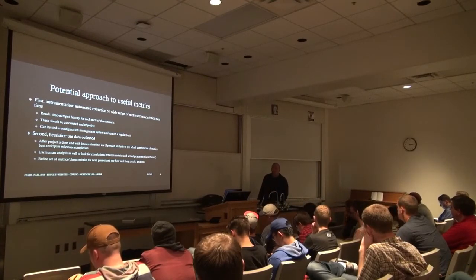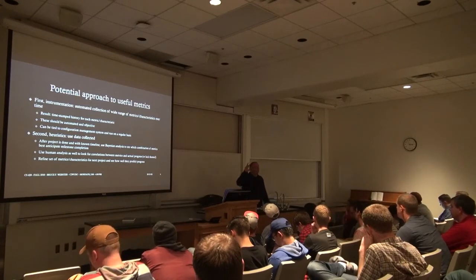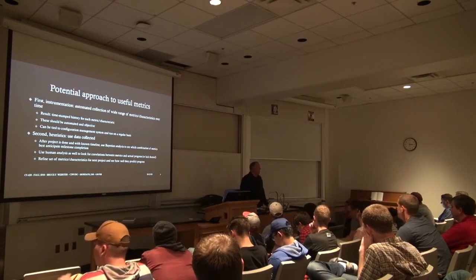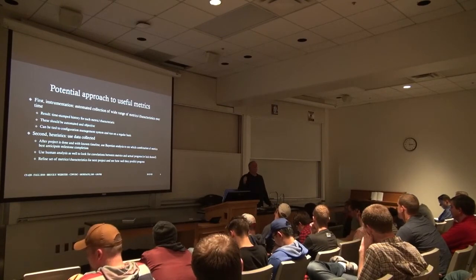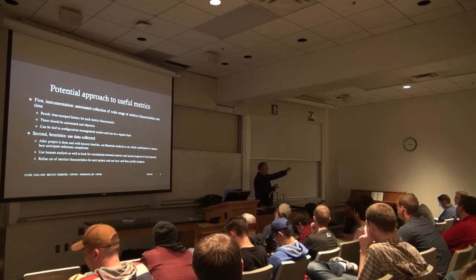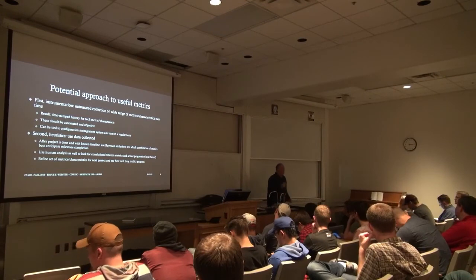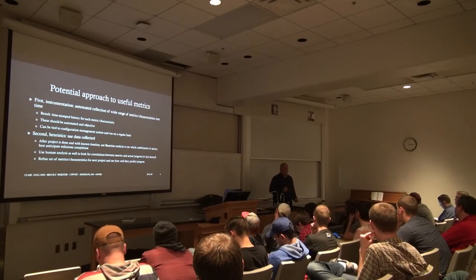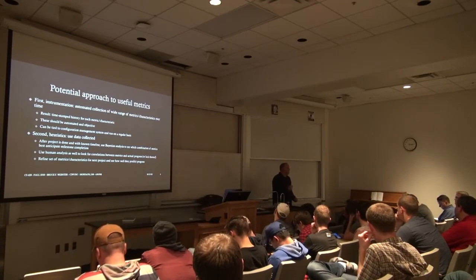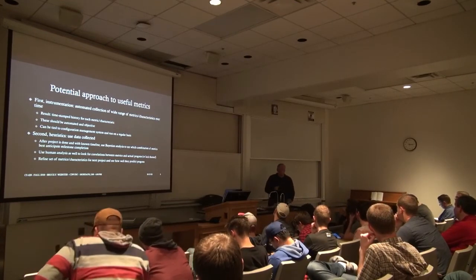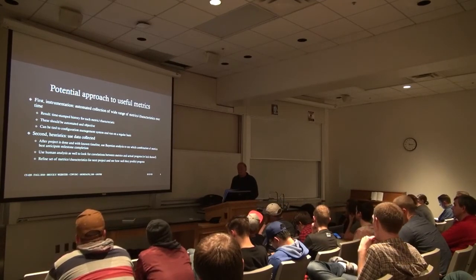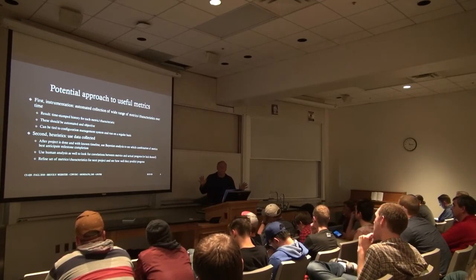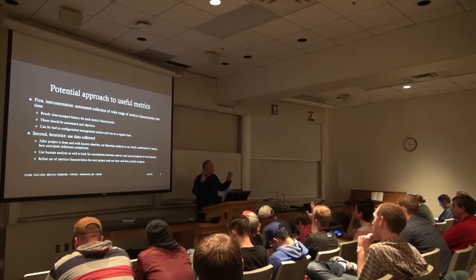And I took the same COCOMO 2 model he did and showed there were arbitrary decisions he made on some of the inputs. And by changing those, and these were decisions not based on the facts of the case, but him just saying, well, we're going to assume this, I could get a 2,500 to 1 variation on the estimate, just because of those base assumptions. So if someone says they have a software estimation model, treat it with a great deal of skepticism, because software estimation models tend to be extremely sensitive